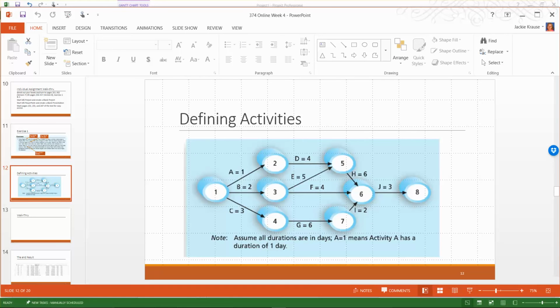H, well, this is interesting. H might be a little bit different. H, coming off of this node right here, is task H, and that comes down. But notice that there are 2 arrows that point in here. So what we're looking at is that there are actually 2 tasks that need to be completed before we can work task H, and that would be D and E.